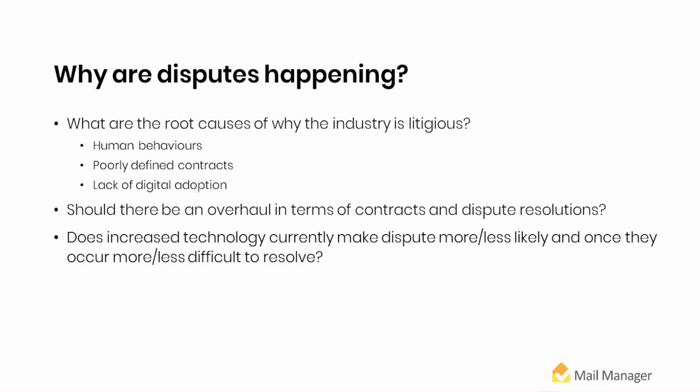And so that's why having some sort of smart contract system, or at least investing more in the front end, and I'm speaking against my own interest here as a litigator, but investing more in the front end of your project inevitably helps in terms of performance. And then once you get into that contract and into that project, and you've had your team buy in, you've had them look at what are the notice provisions of this contract, what do we have to do to properly perform here, putting the technology in place to maintain documents is absolutely critical.